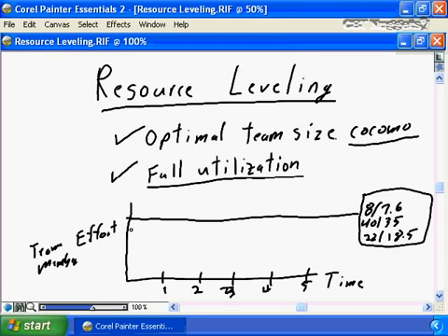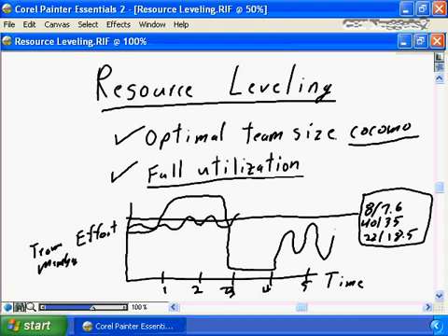And then you're going to look at each individual team member's utilization. If you have a team member that's flowing along at or about the effective level, that's good team utilization. But if you have a team member who's spiking, that starts off effectively used and then ramps up and becomes way overutilized, is working overtime and then drops off and is working only part-time for a period of the project and then ramps back up and ramps down and is a very spiky, very uncontrolled, if I can use that term, utilization, then that is not proper utilization of your resource.